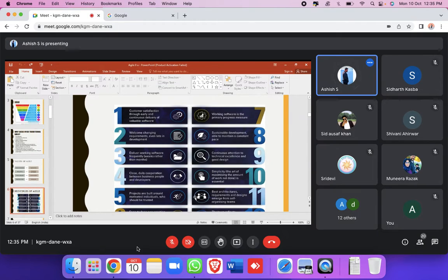In the sense that your project will have a maximum of 6 to 7 releases, and now we are on the 7th release. At that time, if the customer comes to change the requirement, we will accept the change and check whether it can be released in this particular release, or we will convince the client that these features will be released in the next releases. So that is your second principle.